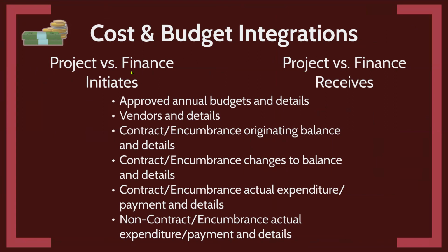And really, one of the biggest things is, if you're thinking about integrating with your ERP system, you have to decide who's going to initiate. Is the project system going to initiate records like contracts, invoices, and budgets, or is finance going to initiate those things? Now, almost always finance wants to initiate those things, and we'll talk about some of the benefits of not taking that approach. But these are typically what you're going to integrate, right?